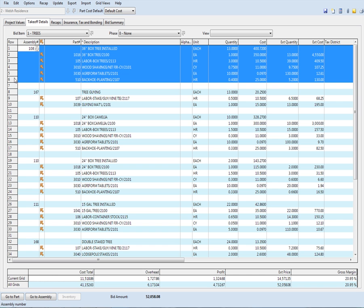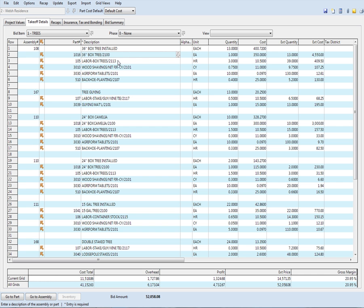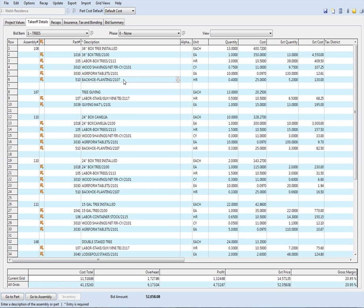So to plant a tree, and you know more about this than I do, this is a 36-inch box tree. In order to quote somebody a tree and plant the tree, I need to buy the tree, I need so many hours to load it or unload it, I need so many cubic yards of wood shavings put around it, I need so much fertilizer, and then I need a backhoe to help with the planting. So every time I plant one of these, I need one hour, one tree, three hours, three quarters of a cubic yard, and 10 fertilizer tablets.